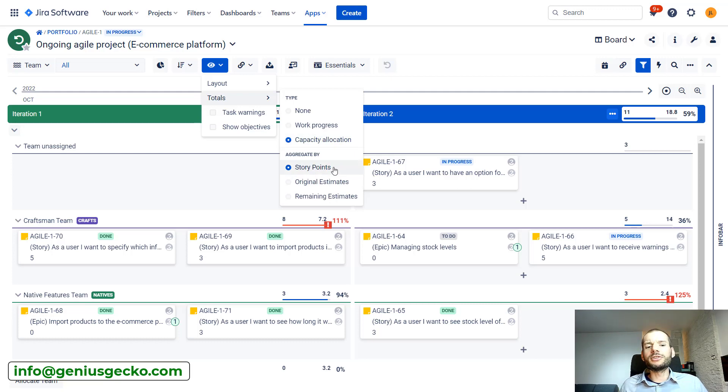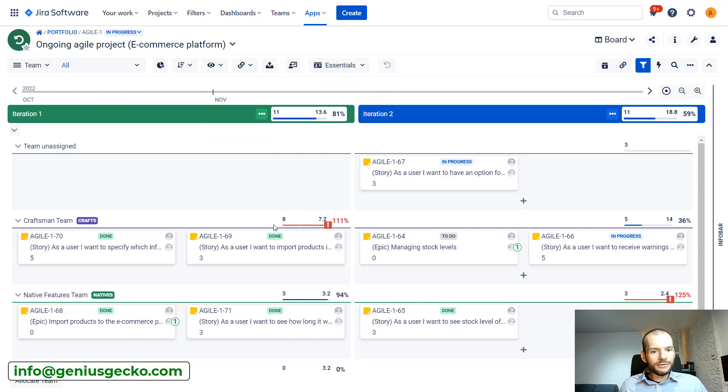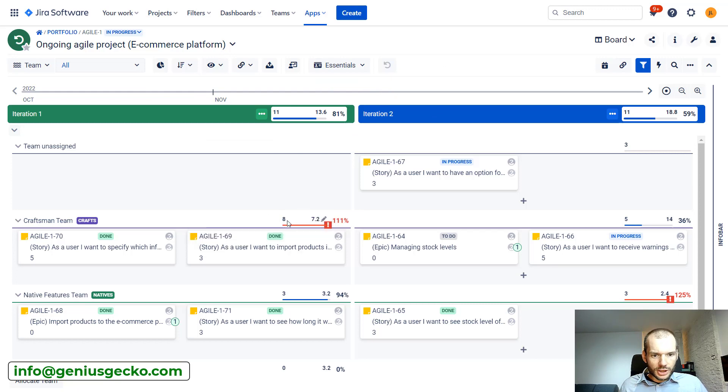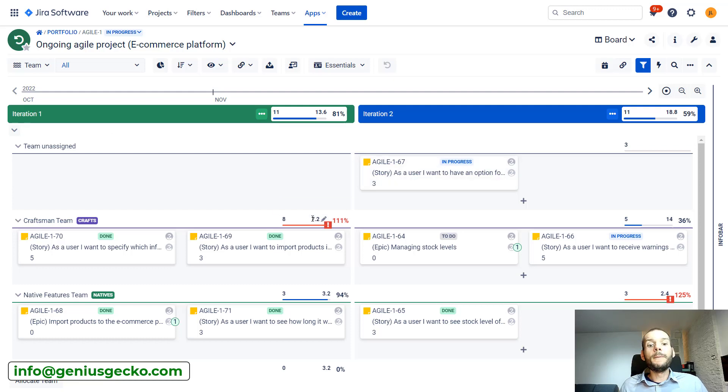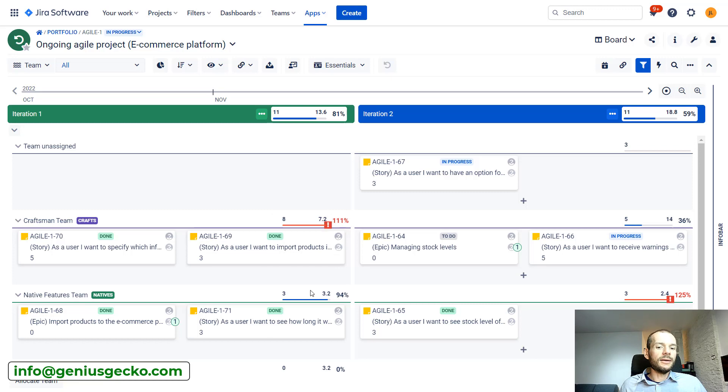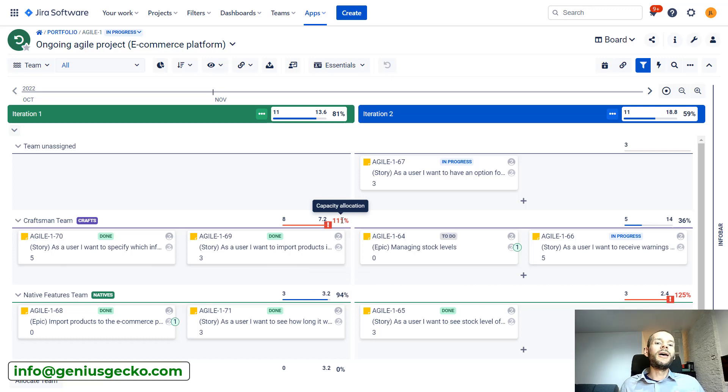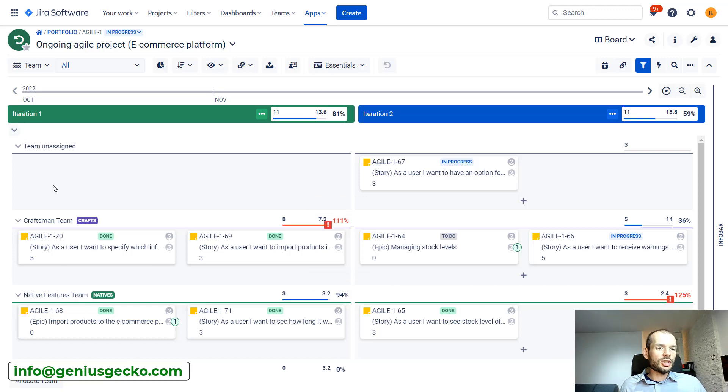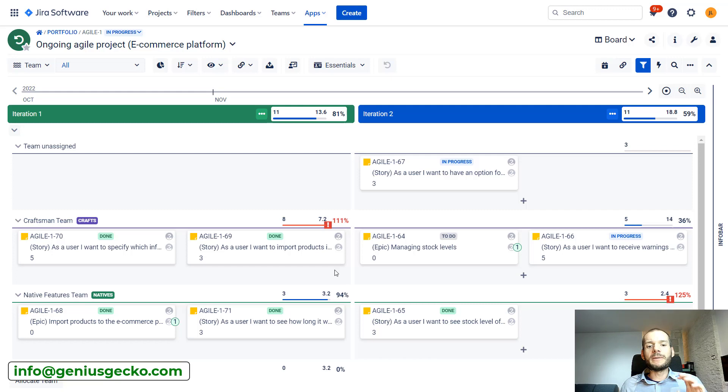This is the most often used metric for estimation in agile. We have information for each team, how many story points were allocated for a given iteration and what is the capacity of each team. Over here we are nearly full for the team, 91% allocation. Over here we over-allocated this team, but still this iteration is closed. Those two tasks are closed. So it looks that despite the fact they were over-allocated, they managed to deliver.